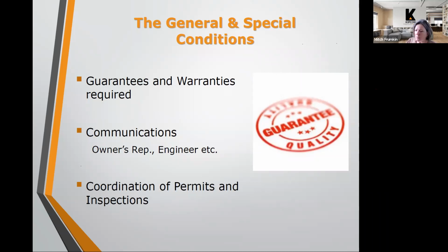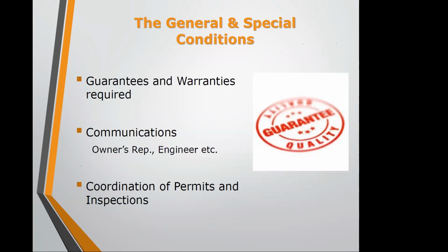AIA forms, sometimes they're written into the contract, sometimes they're not. I've done them both ways, where sometimes AIA forms are submitted, and we will use that in reviewing the invoice. Sometimes it's not specifically in the contract, and the contractor will just give us an invoice on their letterhead, which we will then review.